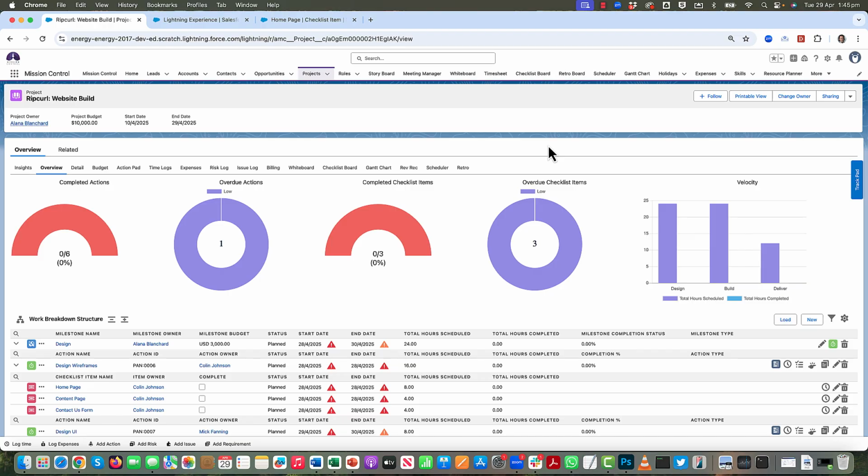For example, if you say you've logged 4 of your 8 hours, but you haven't made as much progress as you were expecting, you can override that to say, let's say, you think you're 25% of the way completed. As a result of that override, your projected hours can then calculate based on, if you continue at the same rate that you've been at to get to the 4 hours, it's more likely to take you 16 hours now instead of 8.